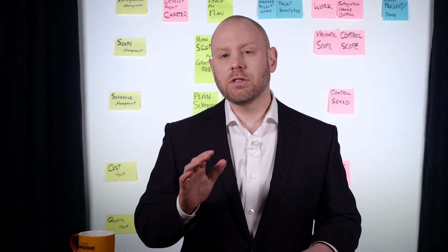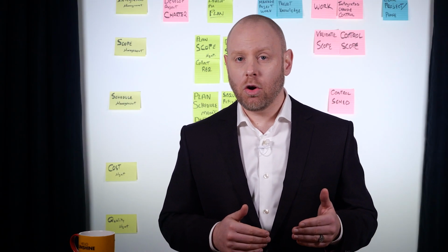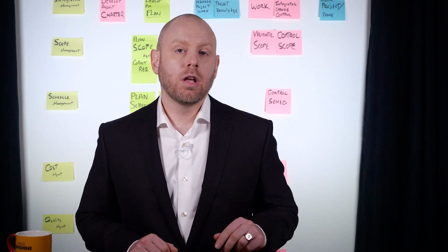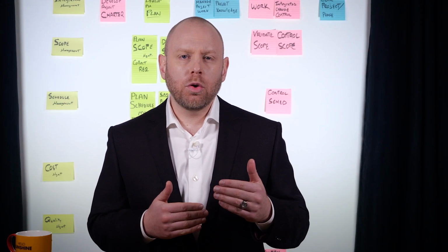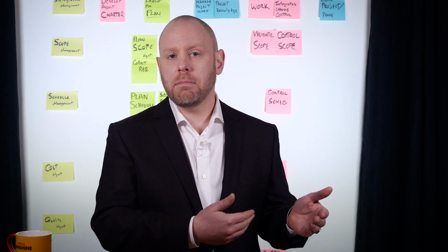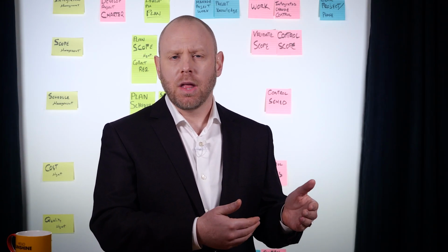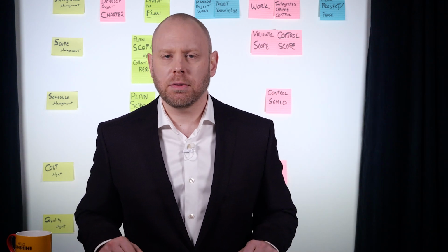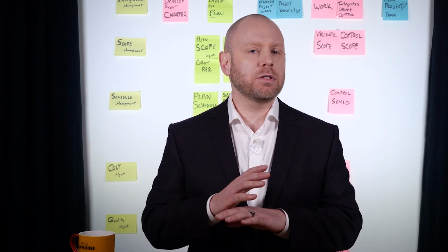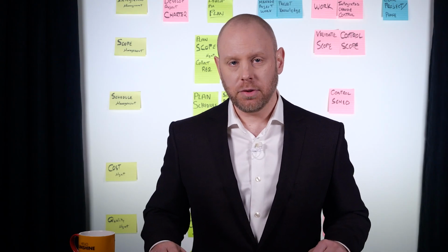Avoid, and this is when we work to eliminate the threat or protect from the impact of the threat. Transfer, as in shifting ownership of the threat to a third party so that they can manage the risk and bear the impact. Think of insurance as a good example of this. Accept. Acknowledge the existence of the threat, but don't take any proactive action to deal with it.